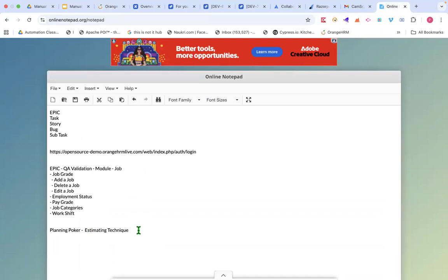So that is something we call planning poker, guys. Planning poker is a kind of estimation technique wherein you are segregating your work. We follow an approach called the Fibonacci series. What is the Fibonacci series? Very straightforward. You start with 1. Actually, it starts with 0, but we are not considering 0. 1, 1, 2, 3, 5, 8, 13,